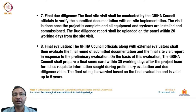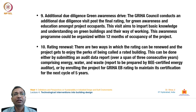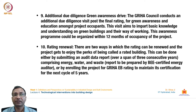The final rating is awarded based on the final evaluation and is valid up to five years. An additional due diligence — green awareness drive — is conducted by GRIHA council post the final rating for green awareness and education among project occupants. This awareness program can be organized within 12 months of occupancy.